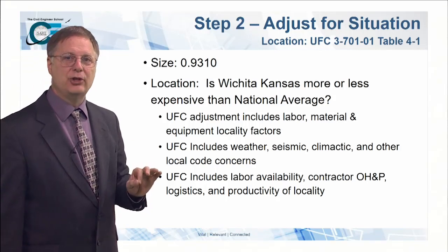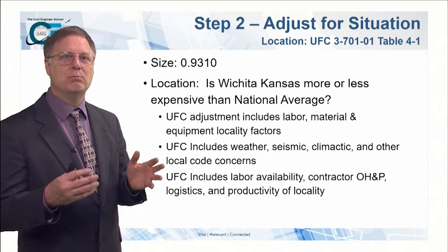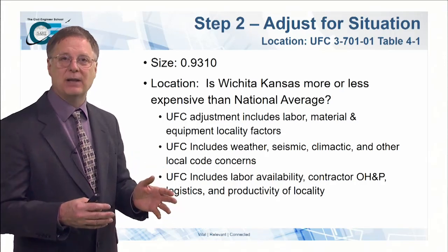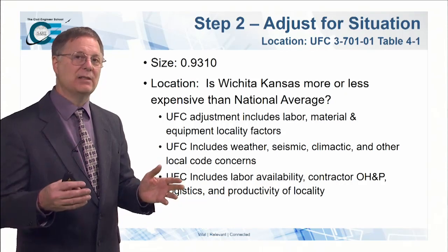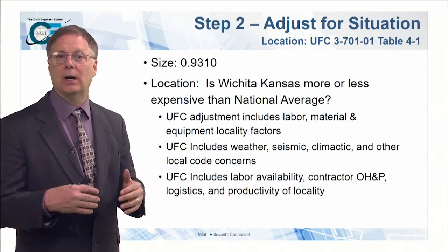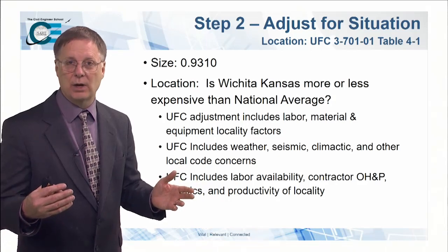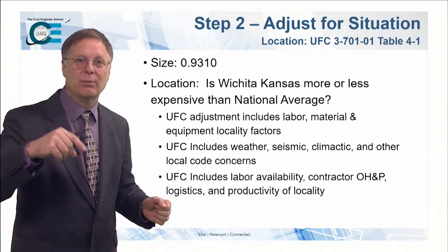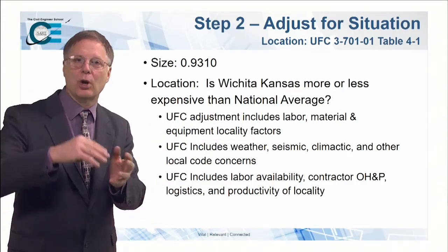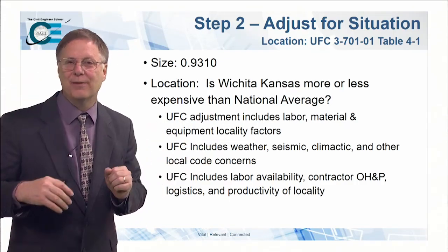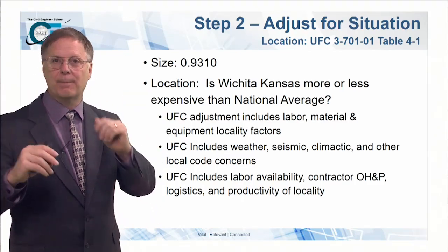All of that is considered in the pricing of an area cost factor. The key thing that probably frustrates people the most is that it's a moving average. It depends upon the national average for DOD. So your prices may actually go up in your area over a year, and your area cost factor might go down, because as a national average across DOD, you're no longer where you were before. So those averages change from year to year.